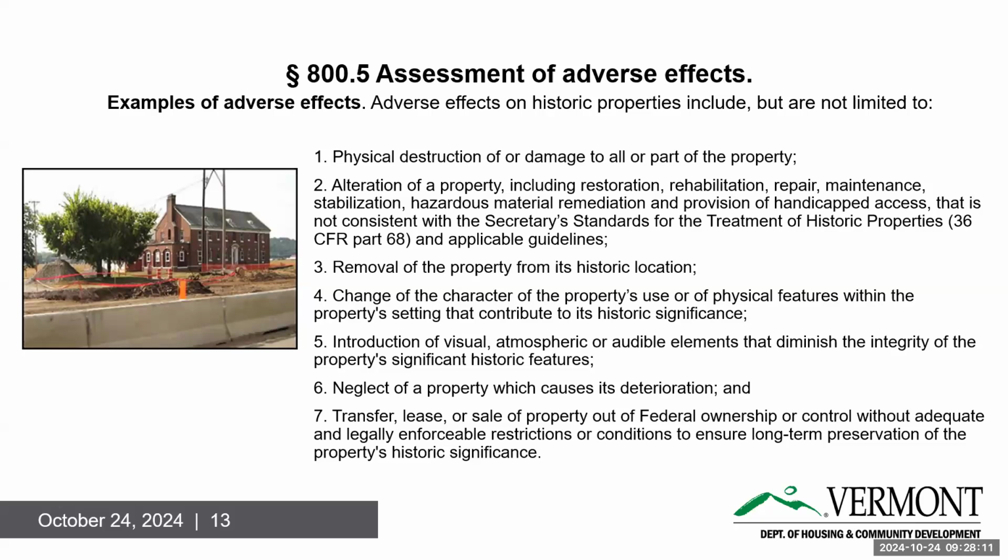So please remember that moving something also brings in another level of review of 30 days with the National Register.